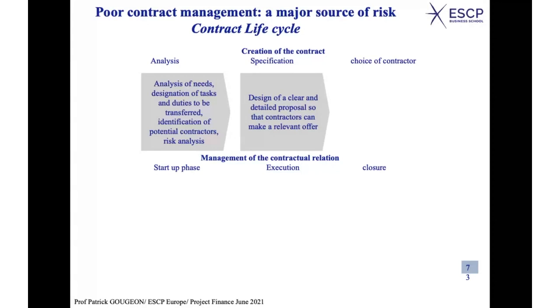Why? Because those who are writing this document usually are not those who have contributed to the analysis. And this is the first source of distance between what is really needed and what is specified in the request to look for an external provider.